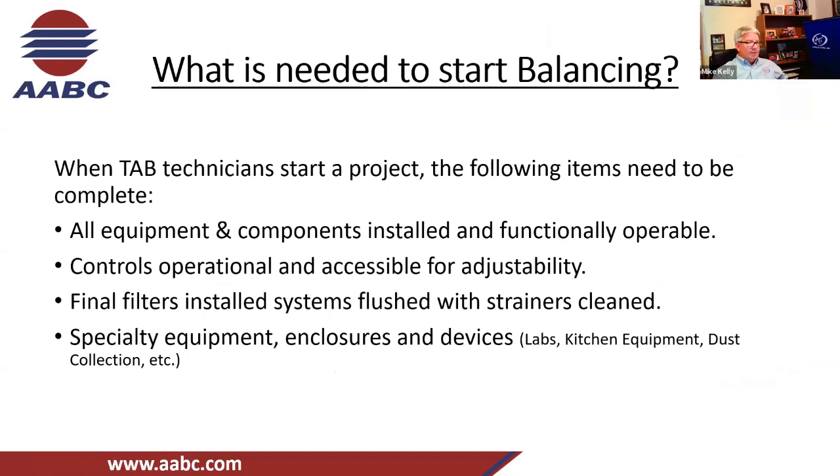What is needed to start? TAB technicians need to start the project with all equipment components installed, functionally operable, controls operational and accessible for adjustability.